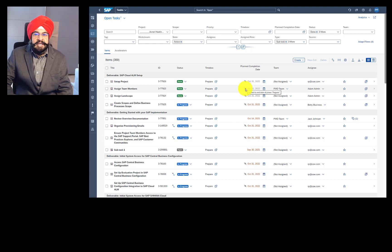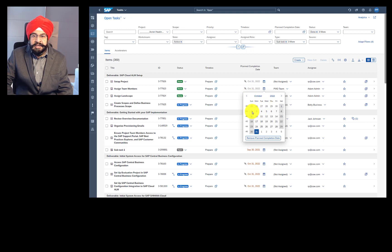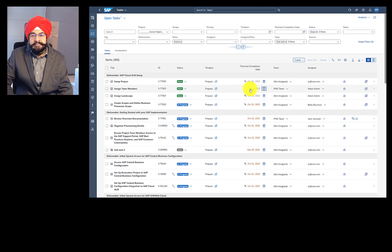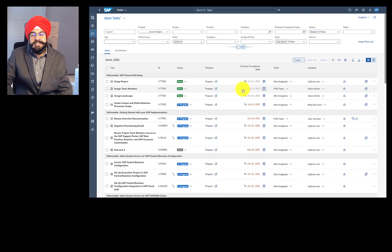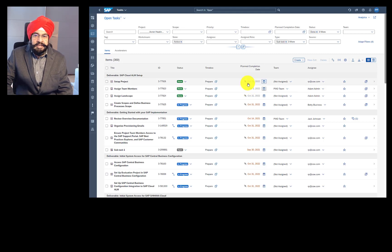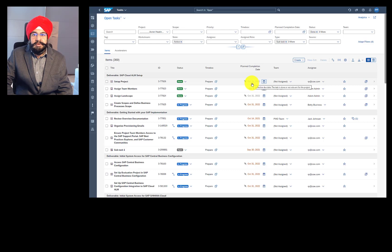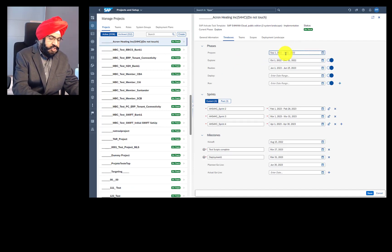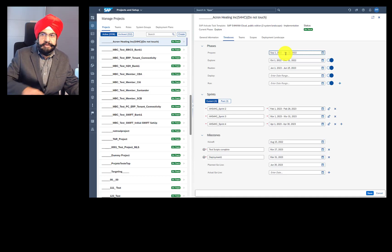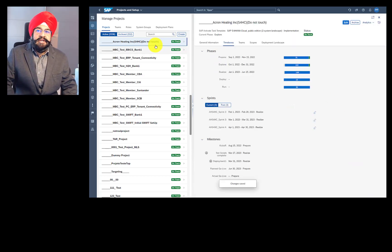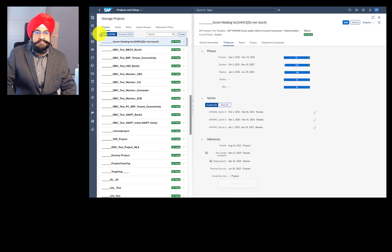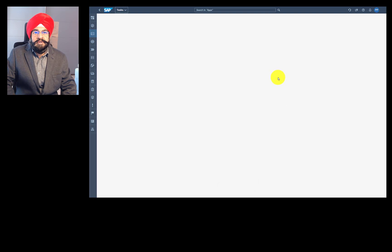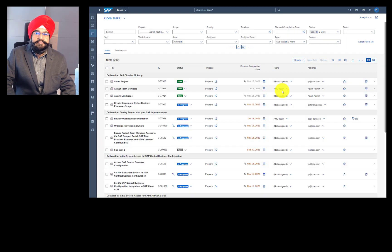You may have some incidents in which you want a special handling. So let's say assign team members. Maybe you want to do it way earlier than the phase end. And let's say you want it to be done on October 3rd. And you see now the link icon is gone. That indicates that now this task assigned team members is a special one because it's manually set. If the phase definition is updated, then these three tasks will be updated, but this one will not be updated. So let's actually do that. And let's maybe change the prepare phase to November 15th. So I'm changing the end date to November 15th.